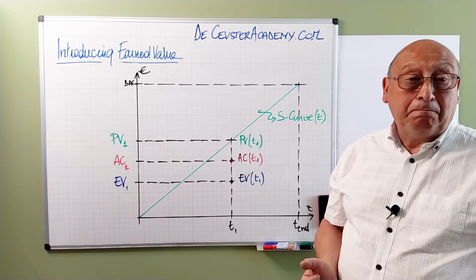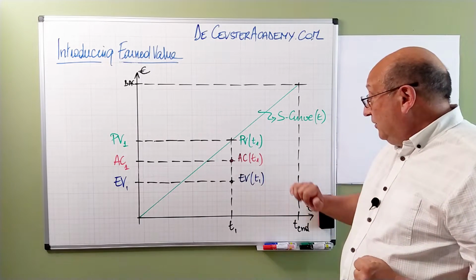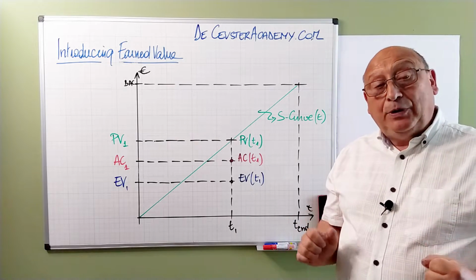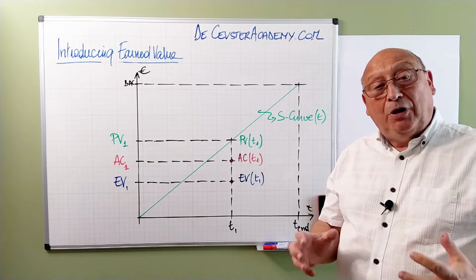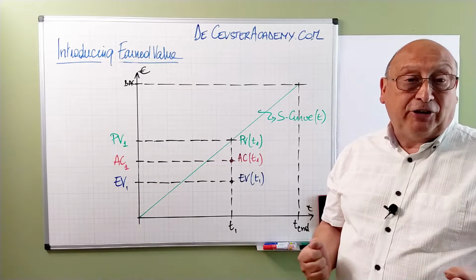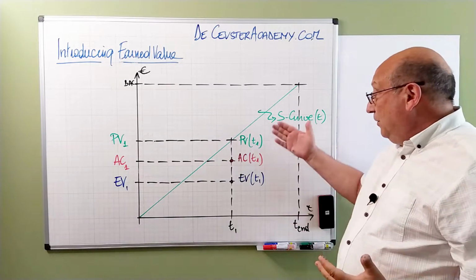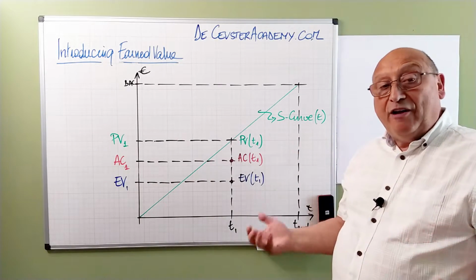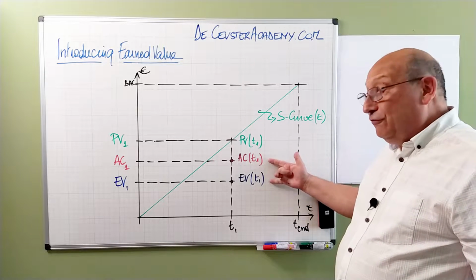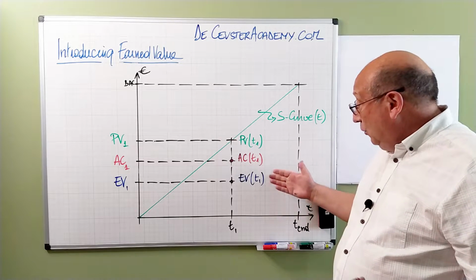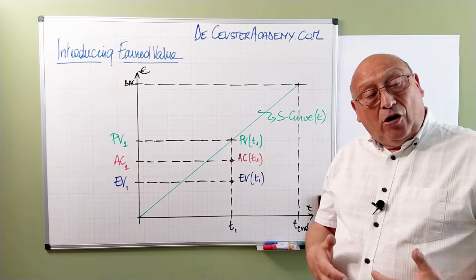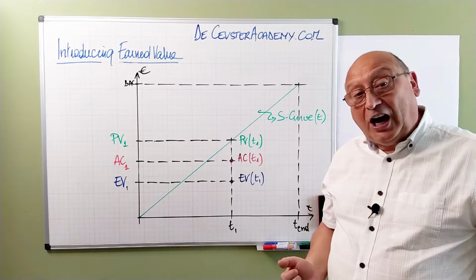The last parameter in earned value management is the actual cost. Here we measure how much we paid for the creation of those deliverables. And this is the information that we in fact have to evaluate. In operations, we looked only at the relation of those two, because here we have an indication of how well we are creating our deliverables, how efficient we are.